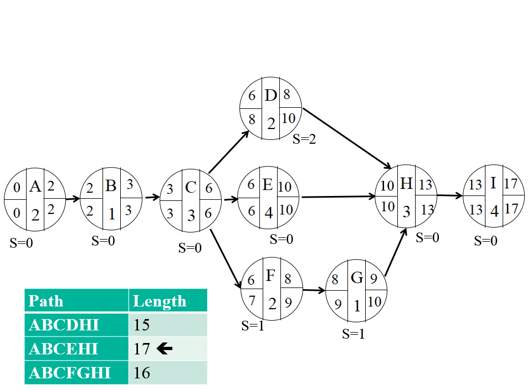The second way is basically you will have to look at the smallest slack here, which is 0, and there should be a continuous path from start to end connecting all activities with least slack, which is 0 in this case, and that will still be the same, A, B, C, E, H, I. By the way, you can have multiple critical paths. In this example you have only one, but if you have a complex problem, you can have multiple critical paths, and you have to manage those paths very carefully. So the critical path in this example is A, B, C, E, H, and I.